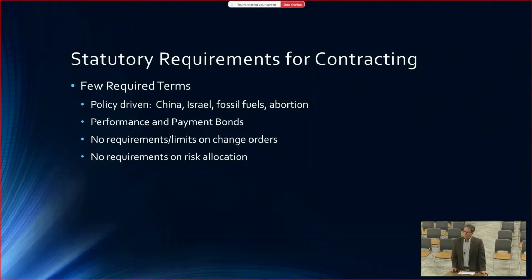Just initially, Counselor Allgood, to your question about changing the scope, I have looked into that before, and Rob's right. When the change of scope is generally within the understood scope of the original project, even if it wasn't part of the original contract, you can modify the contract to add that additional scope. What you couldn't do is say to Benetton, while you're building the pool at Memorial Park, why don't you go build the fire station across town? That would have to be the subject of new bidding. But you can do a modification if the project generally encompasses whatever the addition is.